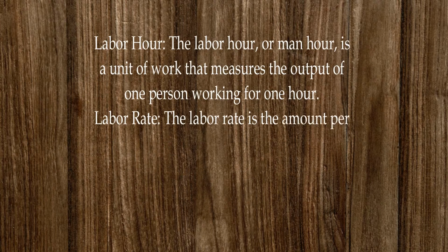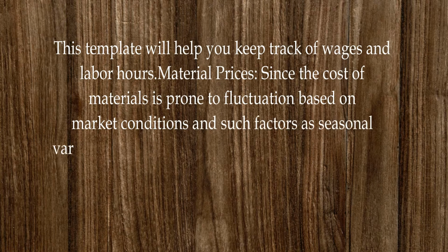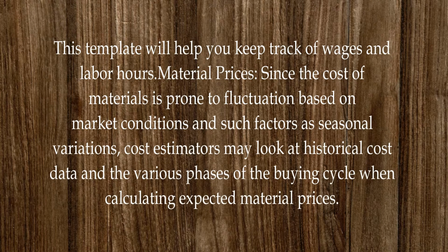Labor hour. The labor hour, or man-hour, is a unit of work that measures the output of one person working for 1 hour. Labor rate. The labor rate is the amount per hour one pays to skilled craftsmen. This includes not just the basic hourly rate and benefits, but the added costs of overtime and payroll burdens, such as worker compensation and unemployment insurance. This template will help you keep track of wages and labor hours.